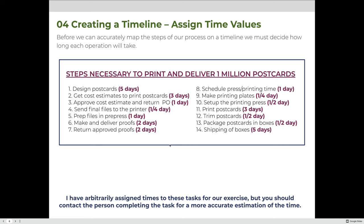I'm going to take five days to design the postcards and three days to send out and get back cost estimates. An entire day to review the estimates, approve where we want the job printed, and send the purchase order. A quarter of a day to send the final files. One full day in pre-press to prepare the files. Two more days to make and deliver proofs to me, one day to approve the proofs, and one day to ship them back.